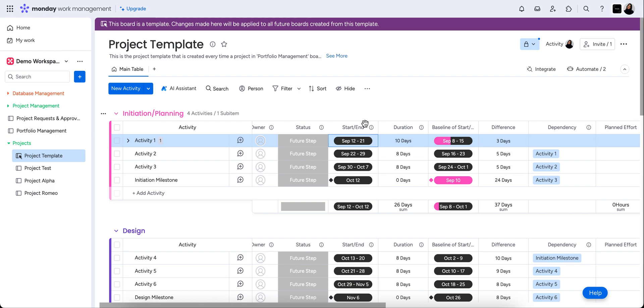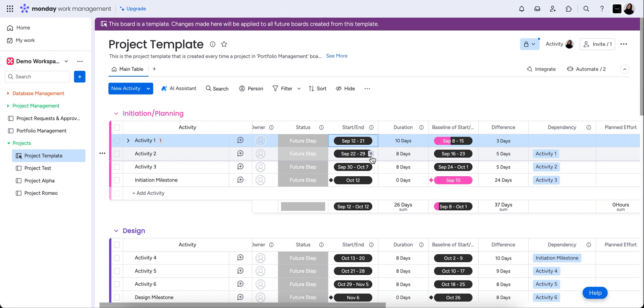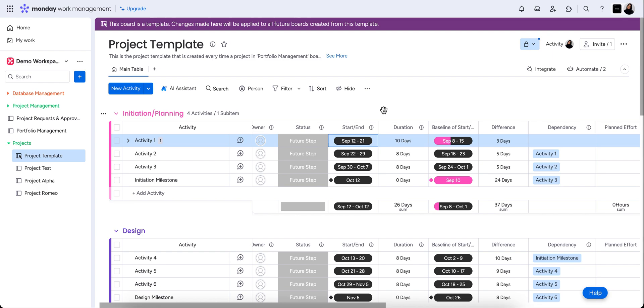So for example, in the initiation and planning stage, if we say that the start date is actually now September 12th to the 21st, we'll see that this automatically changes to September 22nd for activity two. So this is automatically calibrated that the dependency or the start date of this task is dependent on the end date of the previous task. So it just means that throughout the whole project timeline, the start and end dates are calculated and kept current for any delays or changes, or if you finish early, it's all going to be set up automatically that these are going to change for you.